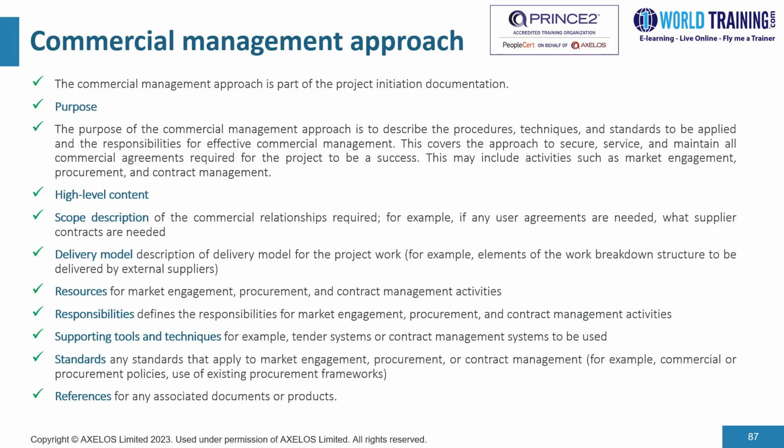Now, this covers the approach to secure, service, and maintain all commercial agreements required for the project to be a success. This may include activities such as market engagement, procurement, and contract management. What are the contents that go into this document? It has a scope description, describing the commercial relationships required. For example, if any user agreements are needed, what supplier contracts are needed, etc.